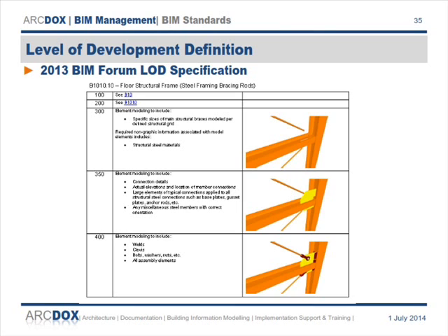Because it seems, particularly when you graft something into this country, there'll be different levels of expectation as to what was priced for, and that is included, that's not included. I can see that there could be lots of... That's happening largely because it's undefined. Yeah. Because it's not being properly defined as to exactly what the deliverables are. Mm. Some projects are defining really clearly exactly what they want everybody to do. And we see other projects are saying, I want BIM, and not actually defining what that means.